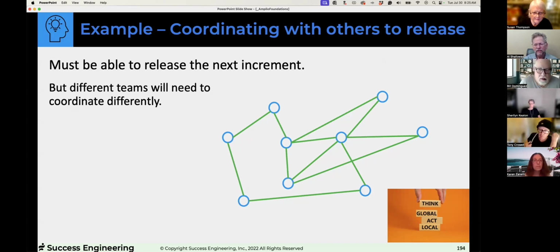What they had set up was you have all these different units, like the transmission, the engine, the frame, all that. And he said they had dates at which you had to be ready. They didn't care how you worked to get ready, but if you weren't ready by that date, it was trouble. They did that, and people knew they did that. Now, what Toyota did internally to those, he didn't actually talk about much.